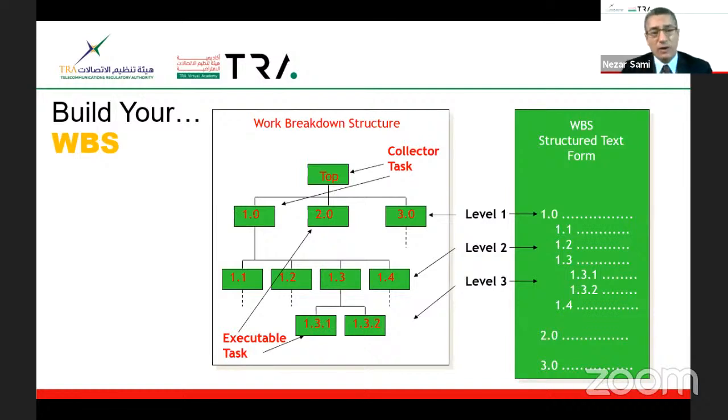The beauty of having a work breakdown structure is that you can easily assign responsibilities. So on the screen, you see 1.0, 2.0, 3.0. Okay, guys, who will be responsible for 1.0? Okay, Mr. X. Who's going to be 2.0? Mr. Y.